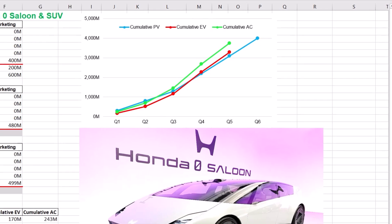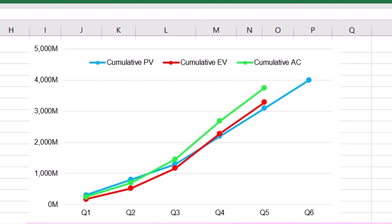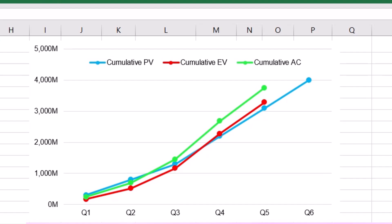So what does this earned value diagram mean for the Honda project team? The analysis shows that the project has significant challenges during its early stages — there is a large gap between the earned value and the planned value in the initial quarters, suggesting the work completed deviates from the scheduled plans. Also, actual costs are not in line with the progress achieved, indicating inefficient resource utilization. However, as the project advances into later quarters, improvements are made in schedule performance, and the cumulative earned value exceeds the planned value by Q4 and Q5, suggesting the project accelerated its work pace to catch up with the original schedule.